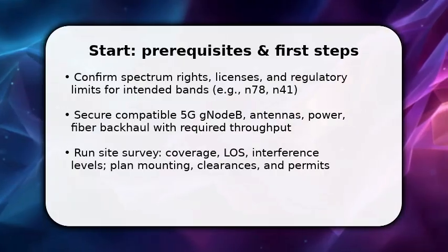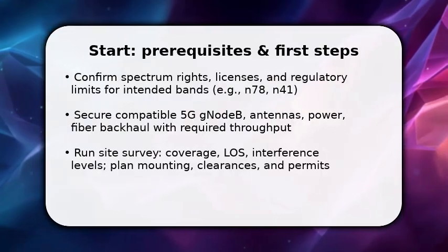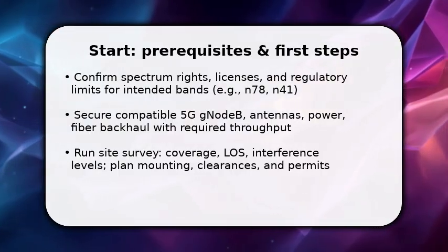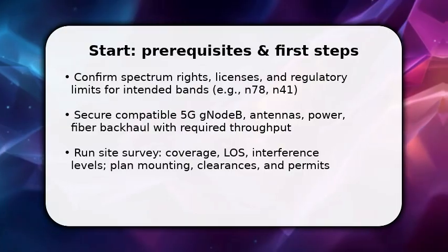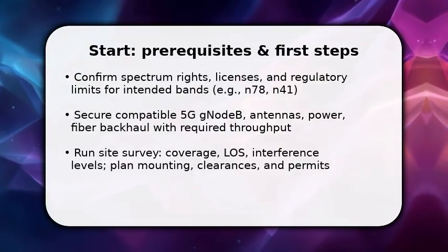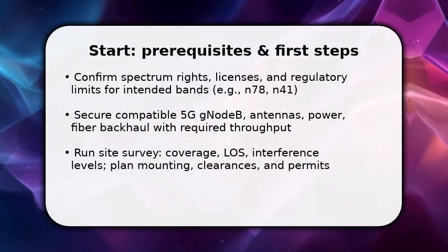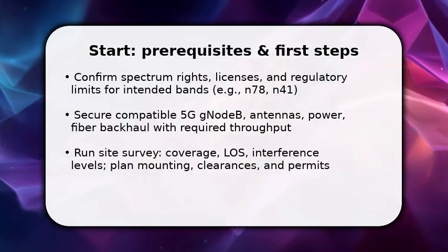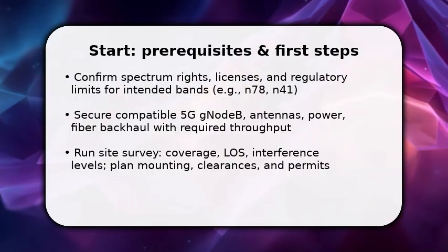You begin by validating prerequisites: spectrum authorization, vendor hardware compatibility, and fiber or microwave backhaul capacity. Once done, perform a site survey to map coverage, line of sight and interference, mark mounting points and required clearance.